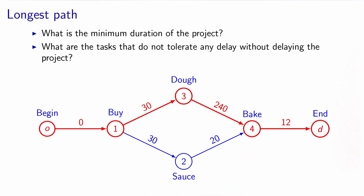Now that we have a network, we can address the two questions: what is the minimum duration of the project, and what are the tasks that do not tolerate any delay? To do that, we calculate the longest path in the network. Note that this network by construction does not contain any cycle, because it is a precedence network. Therefore, the shortest-path algorithm can be used on the network where all costs have their signs changed.